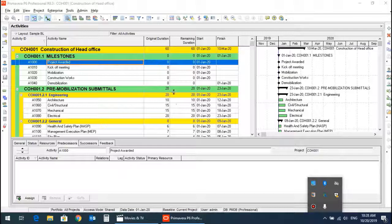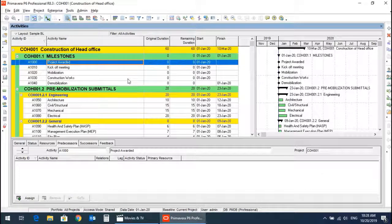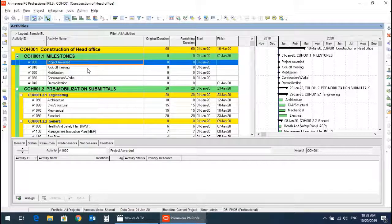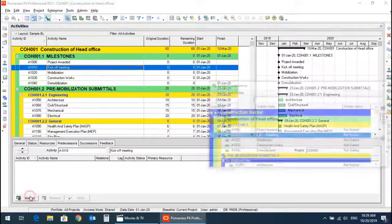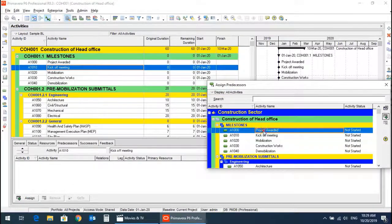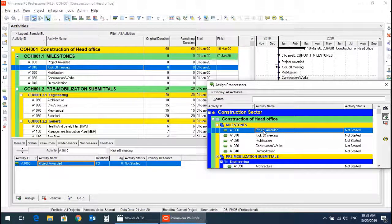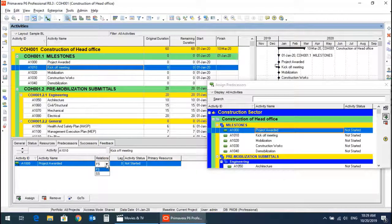In today's video I will show you how to define the predecessors and successors of activities. Project awarded is the first milestone so it has no predecessor. Kickoff meeting is the next milestone, so it has the predecessor of project awarded. Both milestones have a start-to-start relationship.